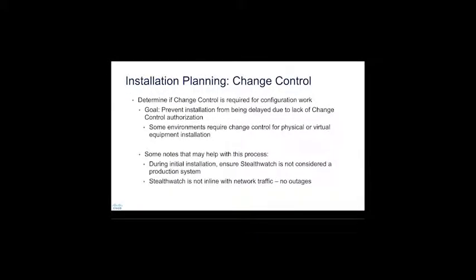So I keep mentioning change controls, and I can't mention them enough, so I even put a slide in here. There are a lot of things that have to happen. We've had large customers, as an example, where we're looking at deploying hardware in their data center for these appliances, and you may be talking about a change control and procedures related to simply racking the hardware. You may require another one for powering the hardware appropriately. You may require another change control for another team that does the Ethernet cabling as a subsequent change control, as well as the IP addressing.